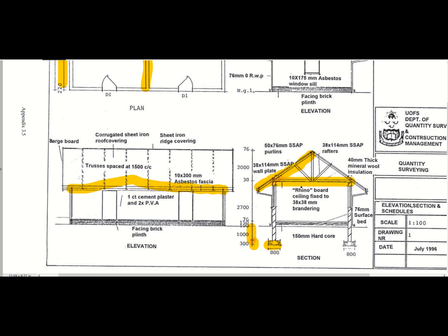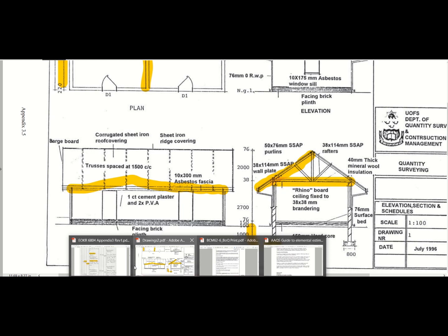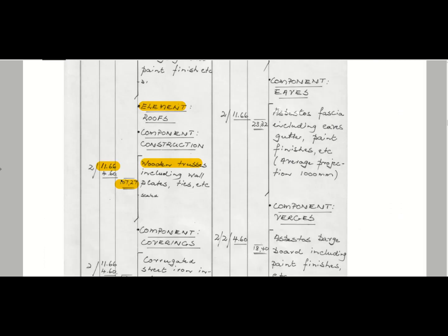Obviously the one on the slanted angle is more accurate because you can easily compare it with previous projects where the angle of your roof differs. So just note that in the example it's measured on the slanted area.